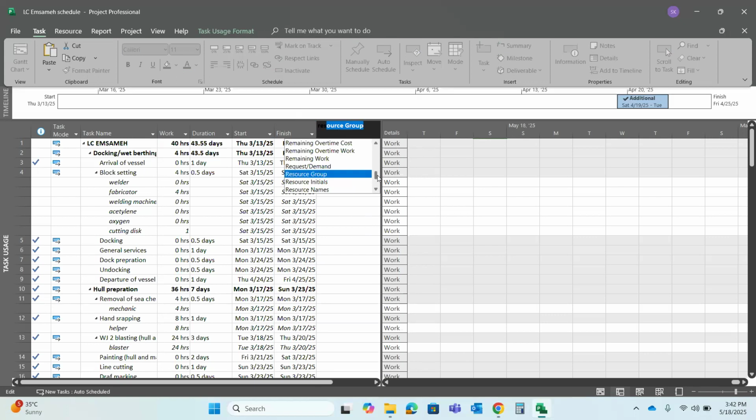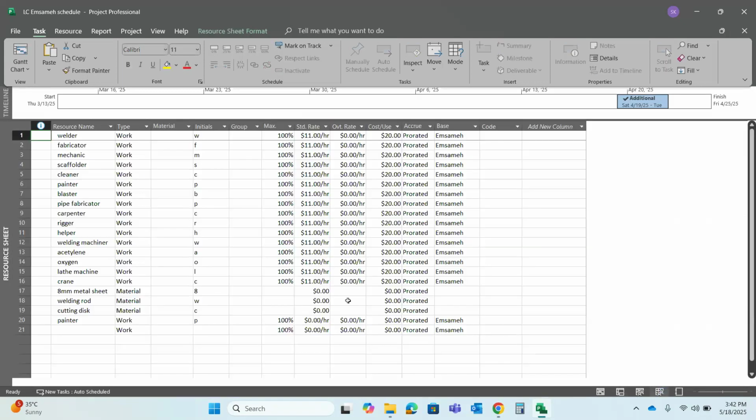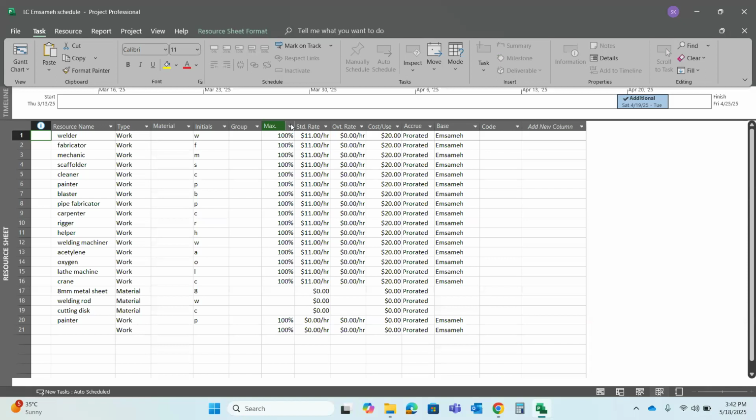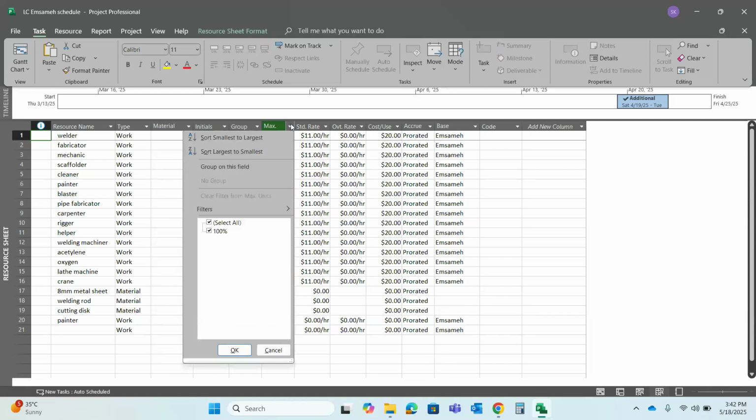Actually, I know this, I remember this one. You can only add... there is one in the resource window called accumulation percentage. You are using this one resource for 100 percentage, right? Go to the resource window again. In the resource window, you can see the maximum allocation is 100 percentage, right? From here, you can change this to 200 percentage, 300 percentage. So you are multiplying, actually.